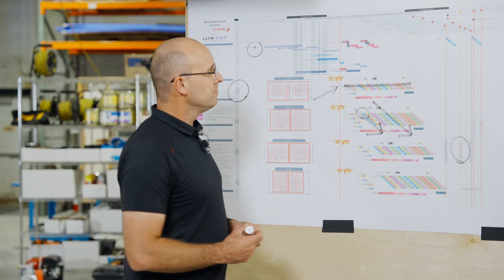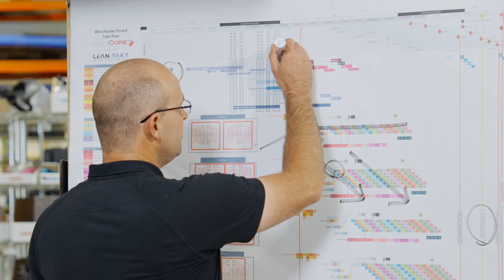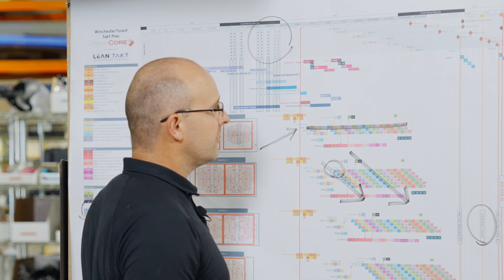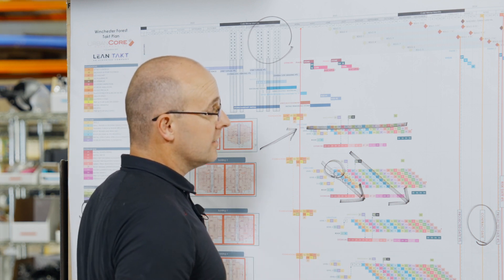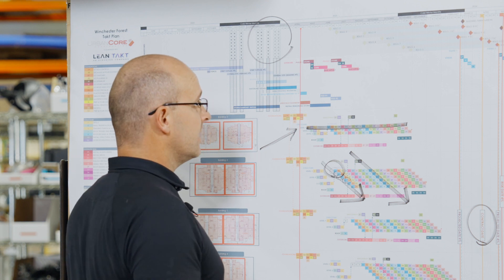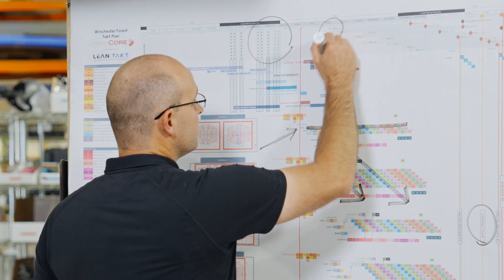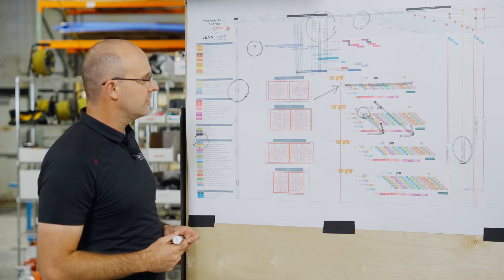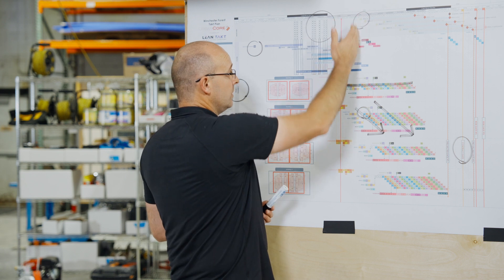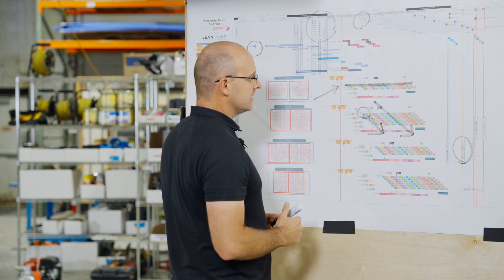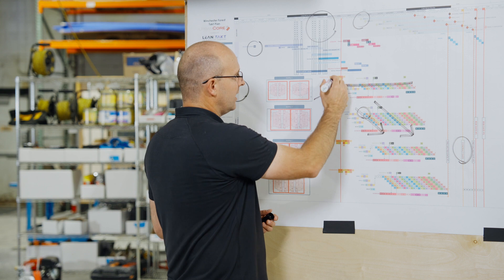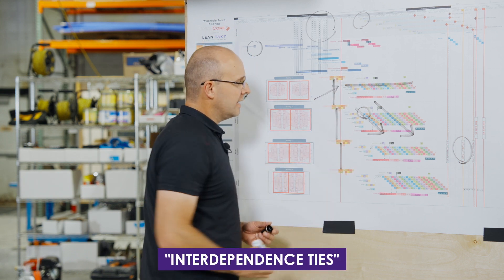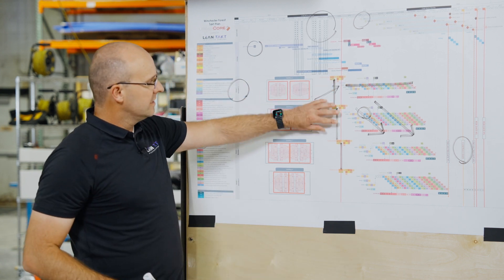A couple more things you need to know. On the top, you will see specific types of days — whether they're weather days or buffer days. You will see things like holidays, whether it's Christmas, Thanksgiving, or the Fourth of July. You will see summaries and milestones up at the top — these identify where they happen in the schedule. And then from phase to phase, you have interdependence ties, which list and line out the connections from phase to phase.